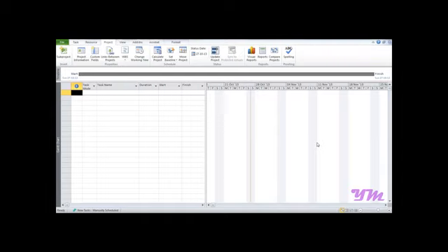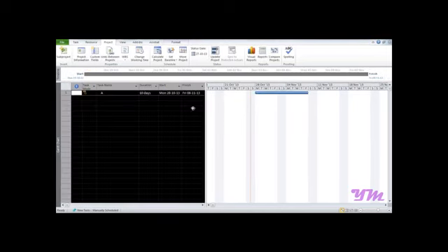Now let's do the very same thing in Microsoft Project 2010. So to begin with, we'll first of all insert a task name, say A, which has a duration of 10 days, and make it an auto schedule using the macro that we created recently. Once done, we would be required to add the resource. So let's go into view, resource sheet, say we have resource M having a maximum value of 18 and rate is 400 rupees per day. And